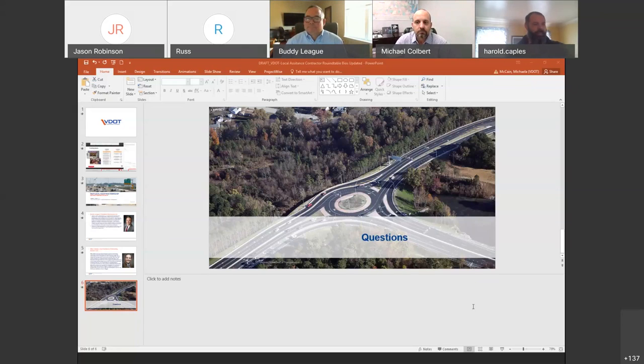I think one thing to wrap that up, I don't want to say a Pandora's box, but having that kind of process laid out helps you provide competitive bids, because you know you have an avenue to pursue. If something does come up, you can put us on notice and reserve that until you understand the true impact. It very well may result in nothing. But from a risk allocation standpoint, it doesn't absolve you, but it puts us on notice that there could be something going on here that is putting the project in jeopardy in some manner, shape, or form. That's correct.